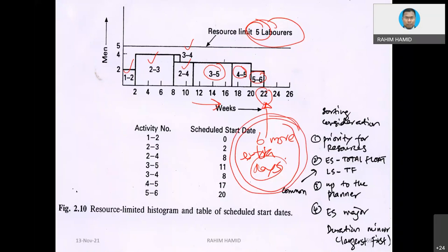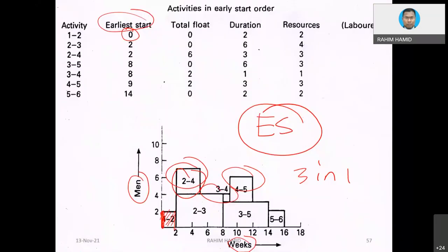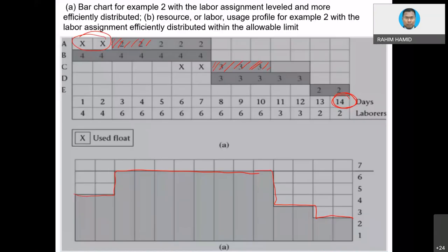Okay. So in this scenario, you can see that the activity duration has been pushed a little bit, a few extra days. But in the previous example that I mentioned, even though we limit the resources, we can still manage to complete the activity within the initial or original project timeline, due to the fact that we only adjust according to available total float.